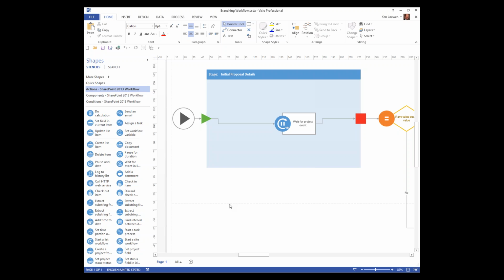We can certainly have the stages of the workflow continue through the project execution, and you could, as an example, have the workflow watch for your project completion percentage, and when your project reaches 100% complete, you could have it trigger a project closeout phase for you and thereby automate that also. So just an interesting technique that I've implemented in a workflow in the past, and I hope this gives you some great ideas for workflows.